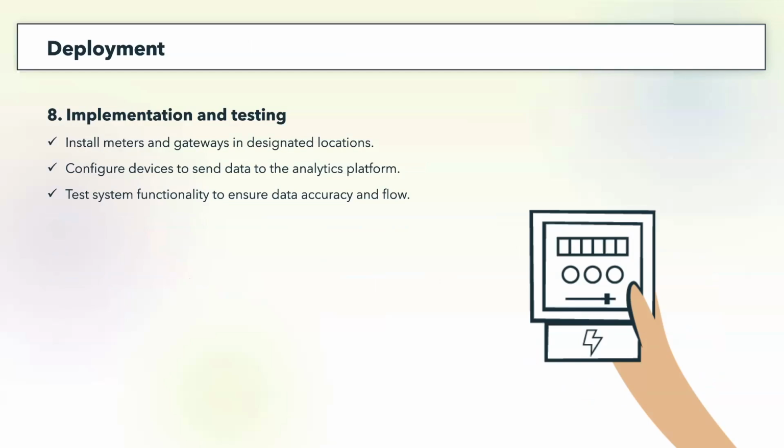And what I'd like to emphasize here is data accuracy, making sure that what you're getting on this end matches what you have in the device, that is validated data, because there's nothing worse than analyzing data that is wrong. Okay, so make sure that the project doesn't stop when you get data across, but when that data is actually validated and it makes sense.